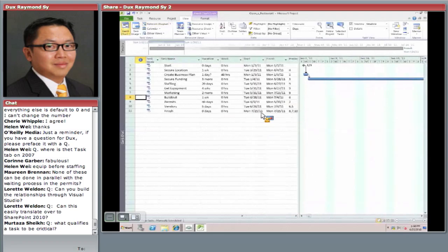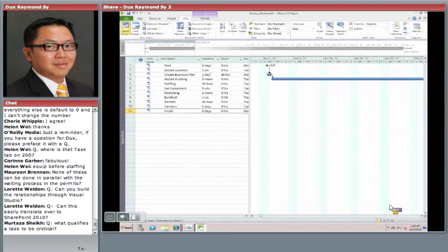what just happened here? A couple of things happened. After linking the tasks, Microsoft Project, at least at this point, based on how I've set the dependencies, helped me figure out when these tasks should happen. Based on your tasks and dependencies, these are the dates it proposed. And again, this is still early. I haven't talked about resourcing yet. But I can have a good idea, wow, if this is the order I go through, looks like I'm going to be done on July 25th, at least for now.